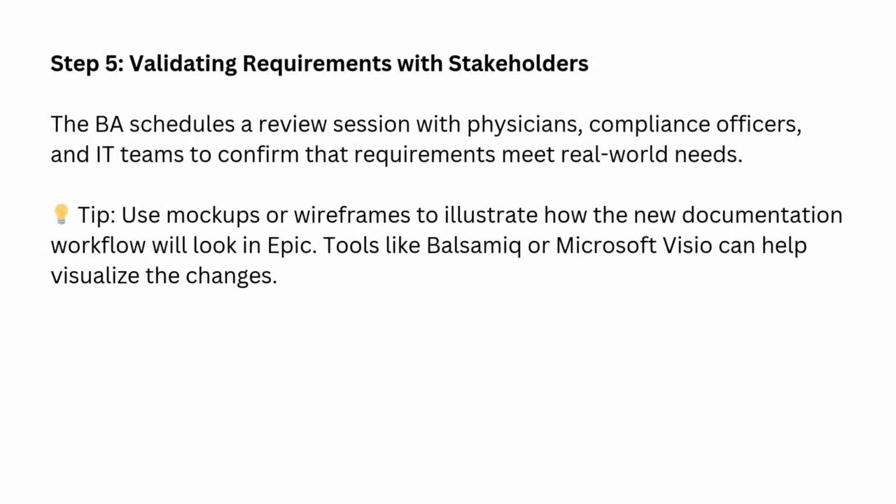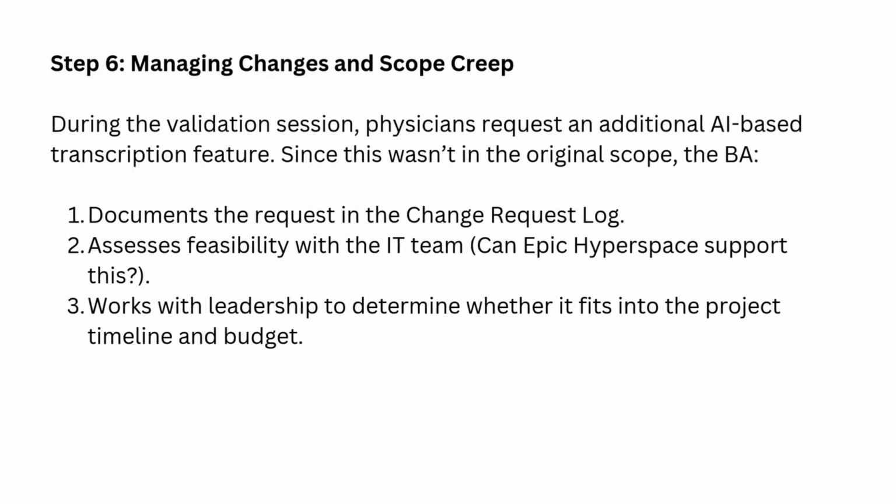It wasn't part of the original plan, but they see it as a valuable addition. So how do you handle that without derailing the entire project? Well, the key is to have a structured process for managing change. Okay. So first, we document the new request in what's called a change request log. Change request log. All right.